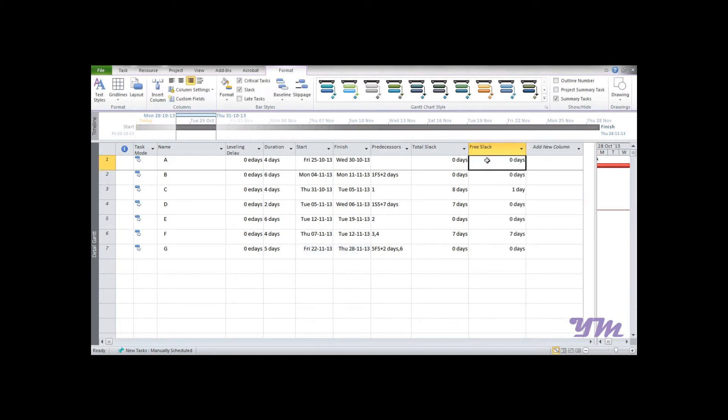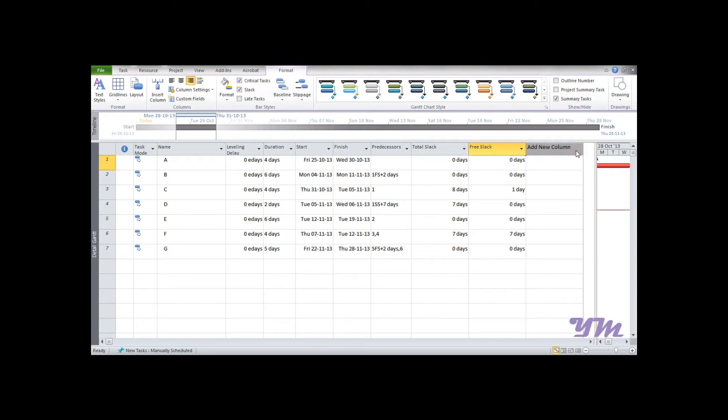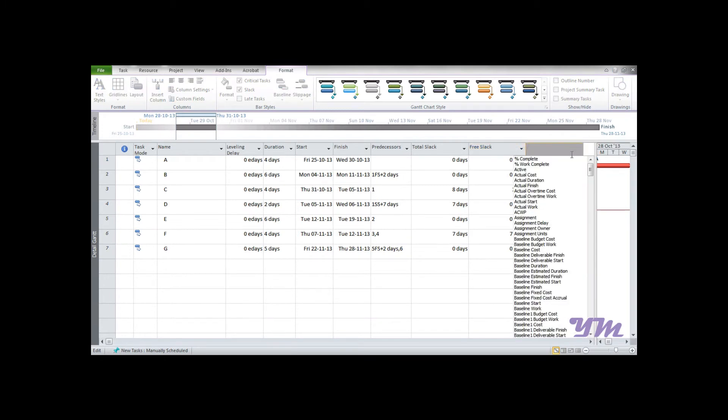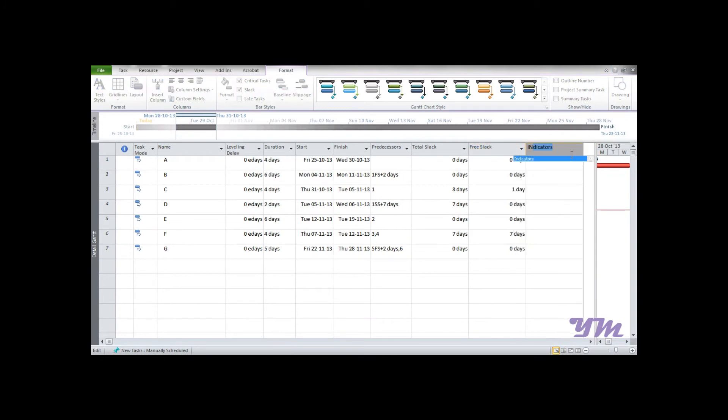After directly adding Total Slack and Free Slack, you might be knowing the formula for Interfering Slack, which is Total Slack minus Free Slack. Now if you go to Add Columns and write Interfering Slack, it doesn't appear.